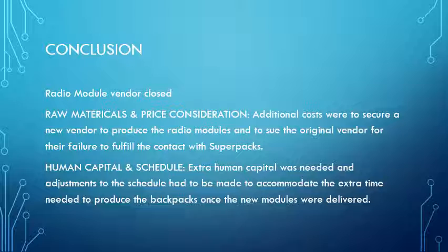The risks were planned for before they occurred, and the project was able to be completed within the project schedule and budget laid out when the project was implemented. In hindsight, when the refrigerator module was ordered, we should have confirmed the original specifications and sizes of the module before shipment, and this could have avoided the additional costs incurred to return the module to the original vendor.